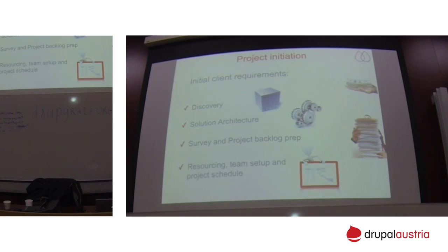So after these surveys, when the preparation of the backlog is ready, we are doing resourcing, team setup, and project schedule. More or less, based on the complexity of the project, we can estimate how much time it is going to take us to deliver the project, and what kind of people we need to involve in order to be capable of delivering the solution, and how much time obviously it is going to take.